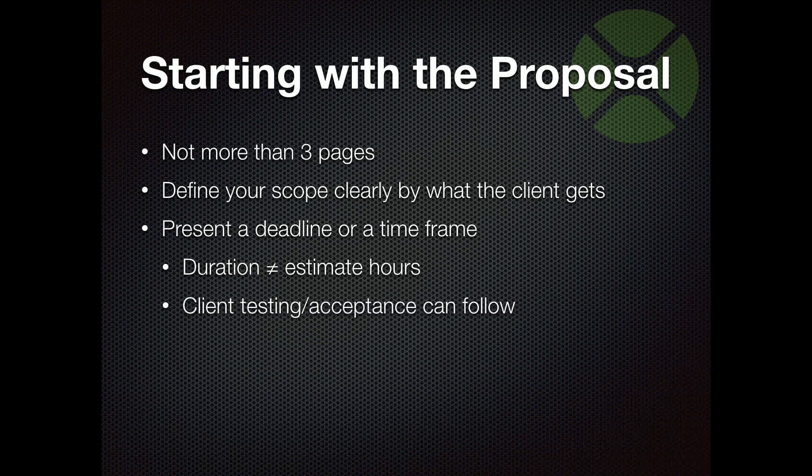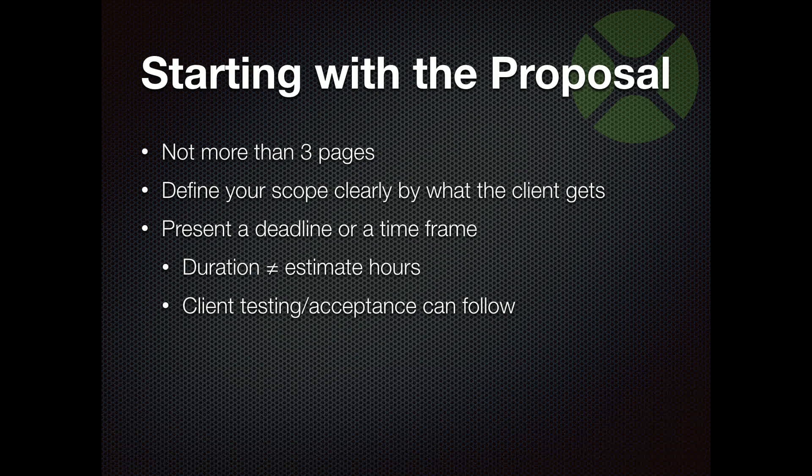One way that you can cut back on that deadline of, well, we don't know how long it's going to take because what if they have changes, and what if there are bugs, and how long are those going to take to fix? So what you can say in your proposal is, you are going to receive something to test on this date. And then you have something that is more in your control to manage.